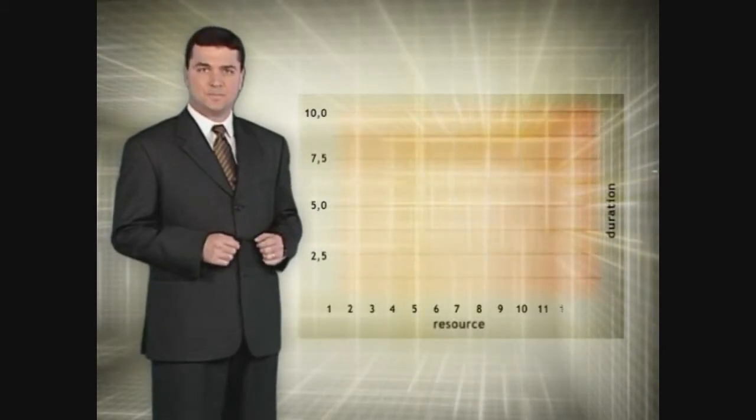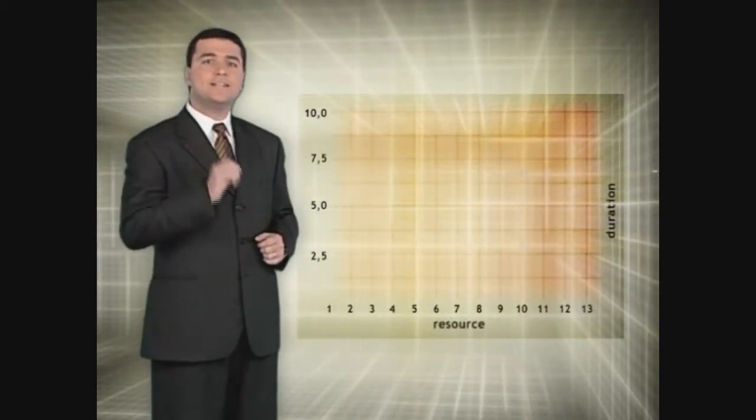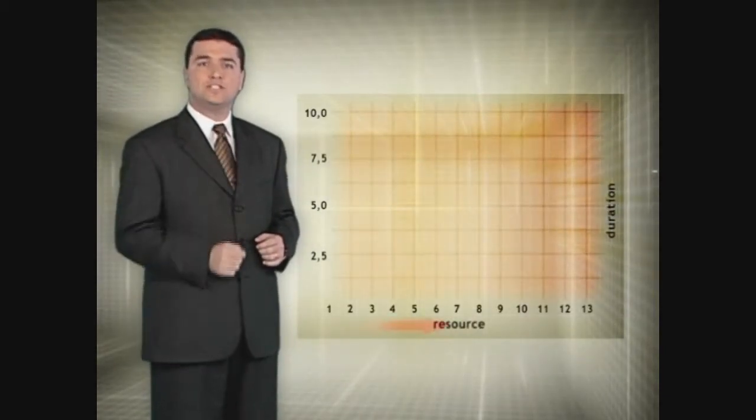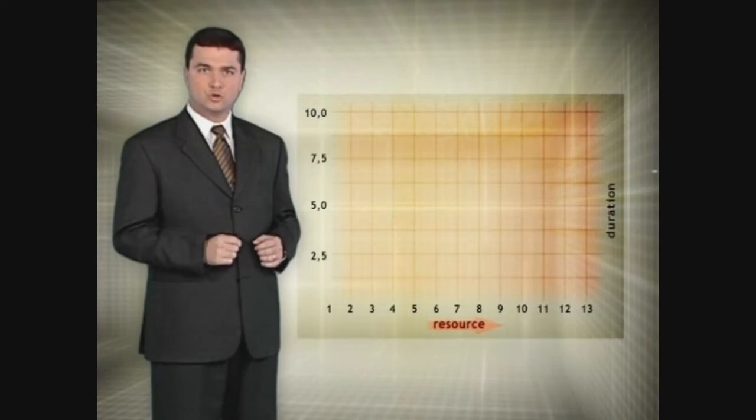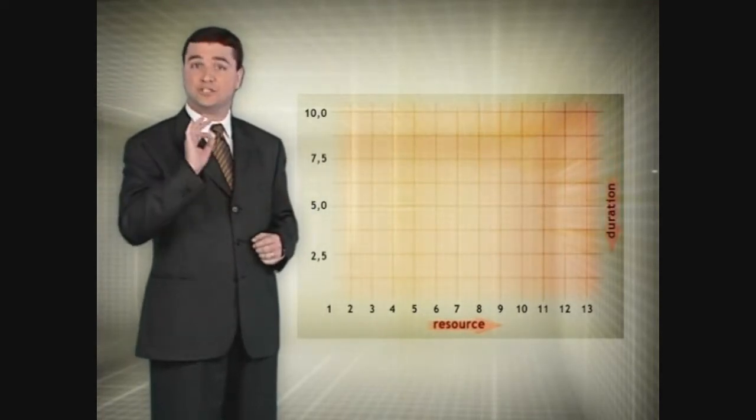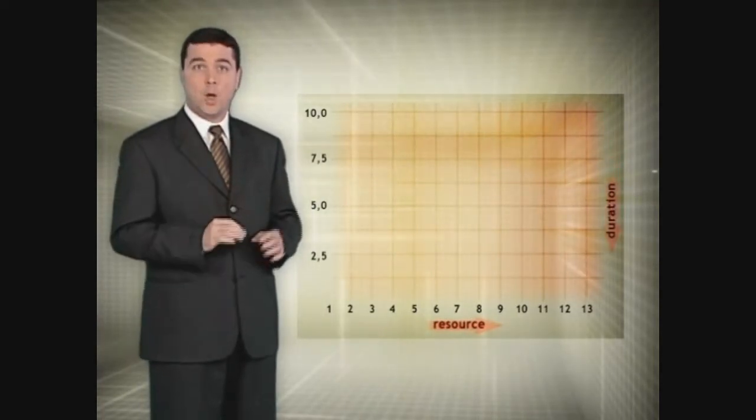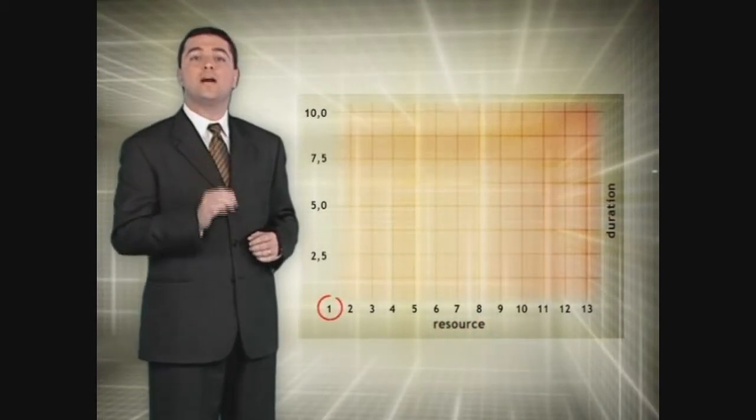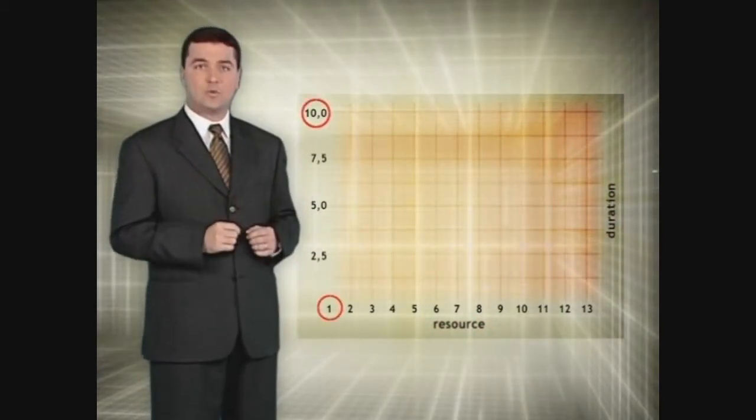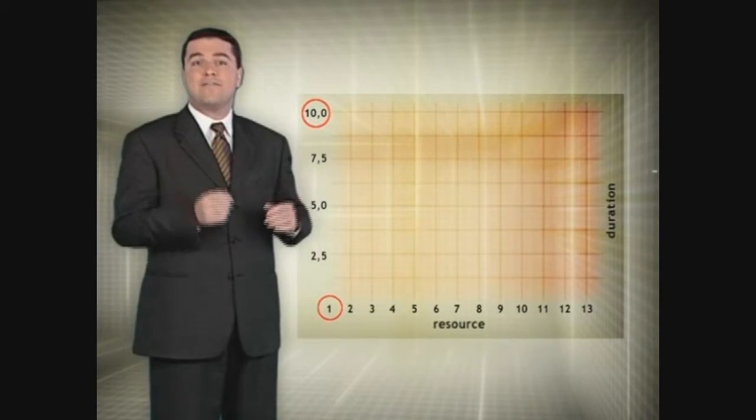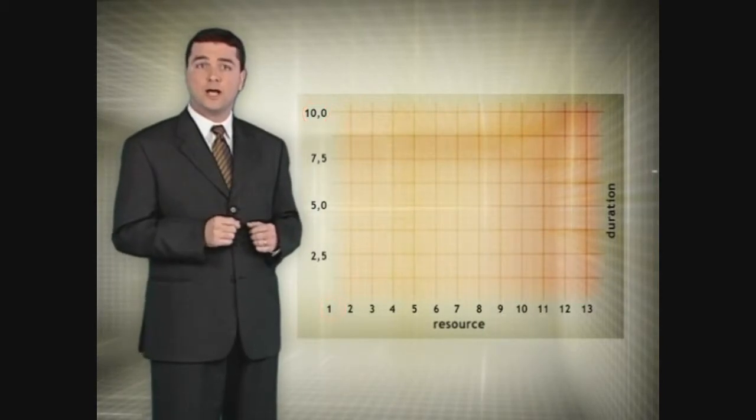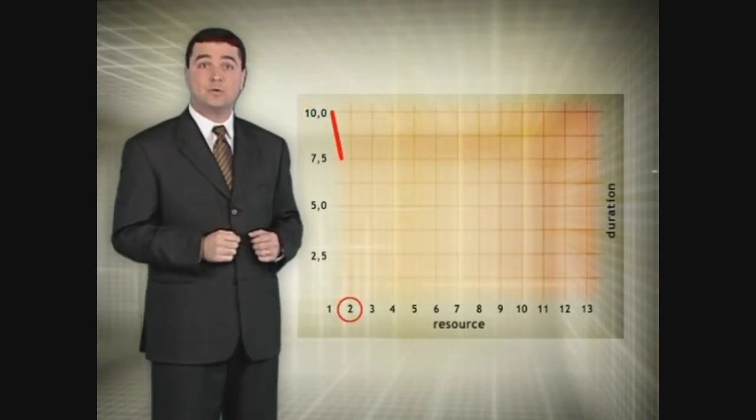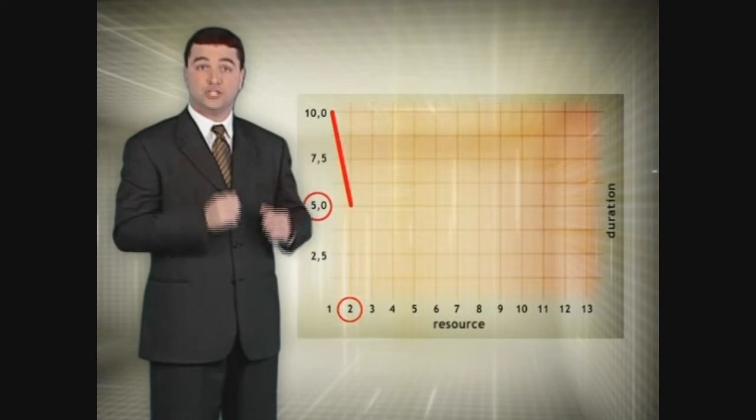One of the most important steps in the construction of a project plan is to consider the intimate relation between the amount of resources used and the duration of the planned activity. The chart at the site highlights this relation. In most cases, an increase in the amount of resources will imply a reduction in the duration of that activity. For example, a painter takes ten days to paint an apartment. It is reasonable to suppose that two painters will paint the apartment in five days.